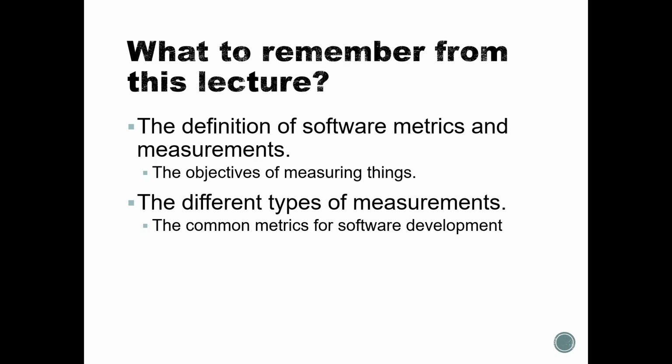What are the first modules, or the most probably problematic modules, that we need to take into account? Because if those work, then the most complex and problematic areas are already done. The rest is easier. And it's always a fairly good idea to start with the most difficult one, because if that is successfully updated or migrated, then everything else will follow.